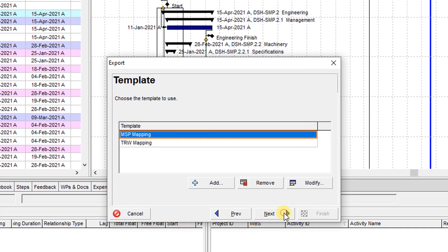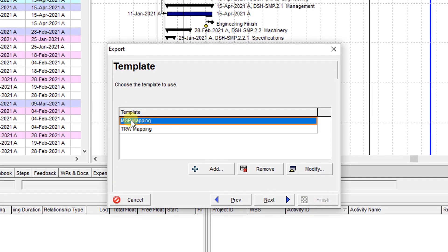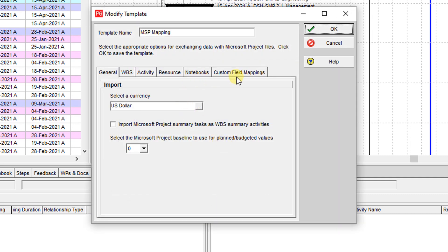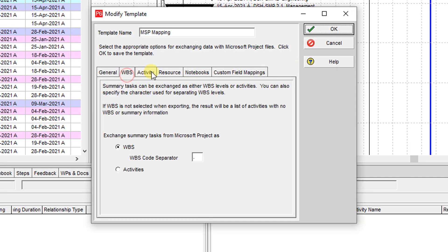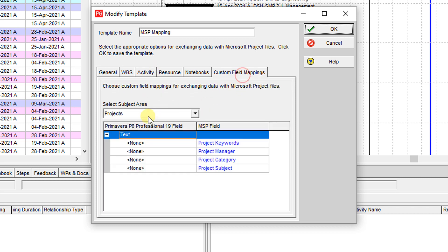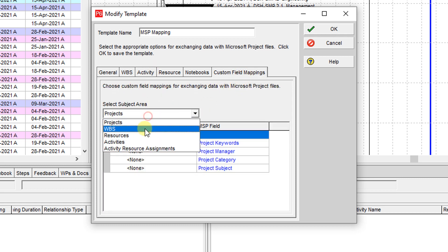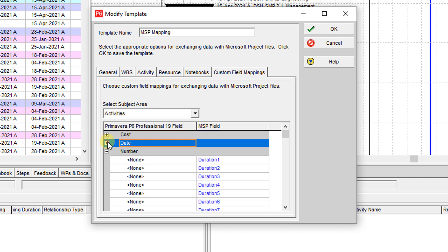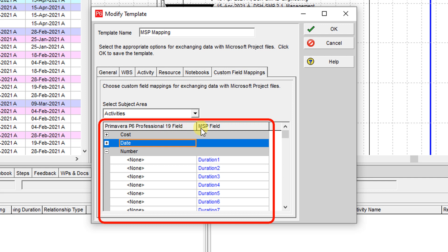Then over here if you want to do the mapping on the WBS, on the activity, on the custom field mapping, for instance over the activity, if you want to map, this is the Primavera P6 professional IT version field, this is the MSP field.